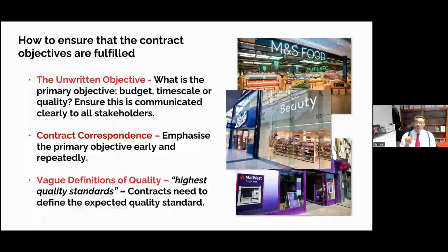Suffice it to say that we were successful in defeating that claim, and having defeated that claim, we saved the project manager from a professional negligence claim, which would have had severe impact. Now, that is a classic case where there was an unwritten contract objective: time at all costs, get us time, even if you don't quite meet the budget, deliver it on time, because we have students who are coming to take occupation.